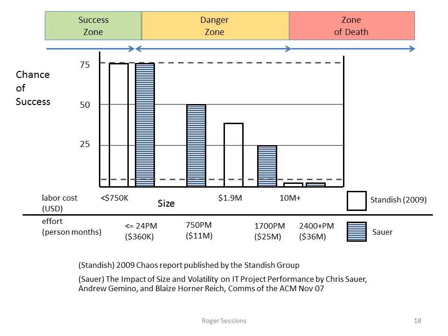By the time the project size reached about $2 to $8 million, that success rate dropped to about 50%. And by the time the project size reached $10 million, the chances that the project would be successful dropped to under 10%, probably under 5% in most cases. This seemed to give clear evidence that the missing factor, the factor X that we're looking for, is the cost of the project.